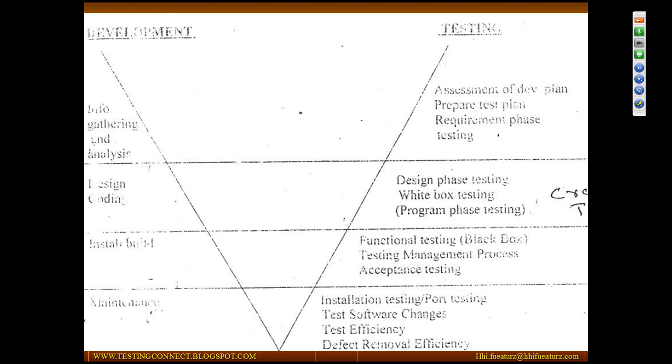Then developers and testers also get involved in the analysis phase. So what will the development team and testers be doing? The development team will come up with their development activities plan. Who will be doing what? Which requirements do you have? How exactly are you going to develop those requirements? Who will take care of what? When, and how much time will it require to develop the entire application? By considering all these factors, they will come up with a development plan.